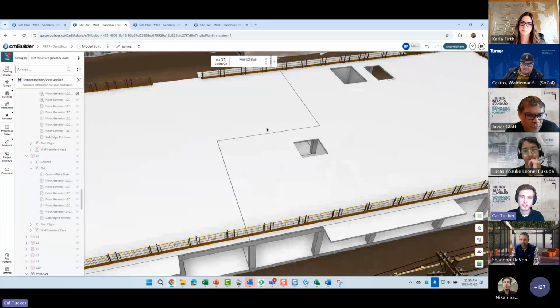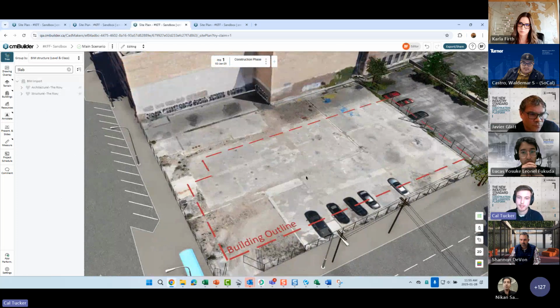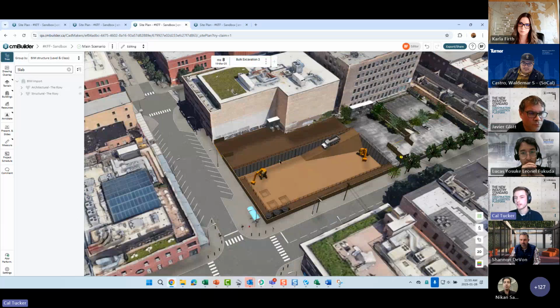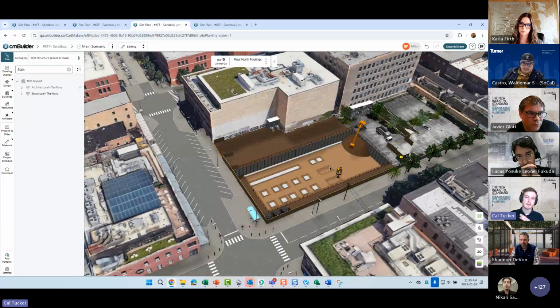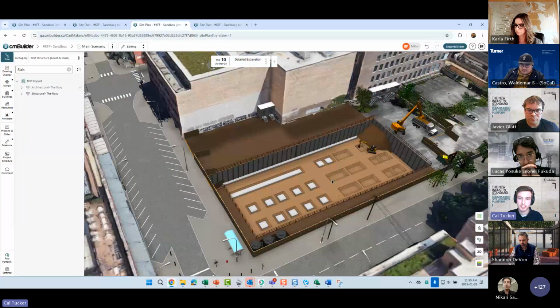Now that we have that completed, just for the sake of the storyline, let's say we're planning this in real time. We're creating our pour breaks, getting the quantities from that. Our scheduling department, in the meantime, is updating our schedule. So once they've created that, we can now relink those milestones we've already created to the updated schedule. And that allows both departments, scheduling and the superintendent in this use case, to work independently and kind of merge their work as they go forward.